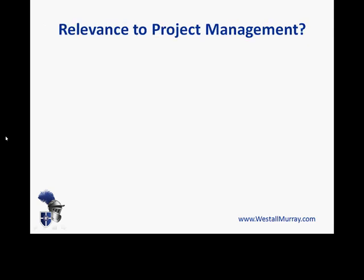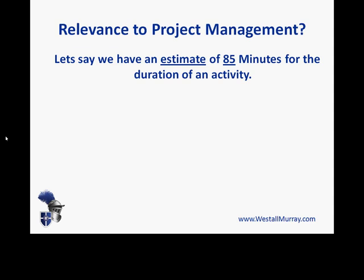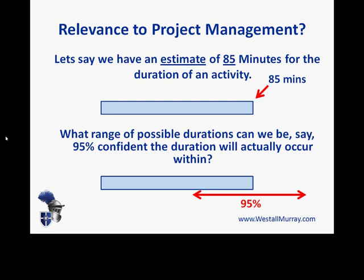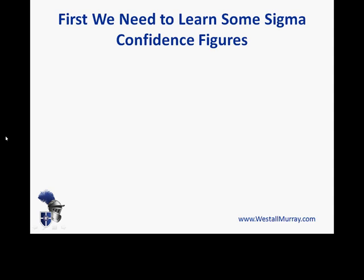Moving back to project management — we estimate a lot of things in project management. Consider an activity where we've estimated the duration to be 85 minutes. That's only an estimate. What we might want to know is: what is the range either side of that 85 minutes that we can be 95% confident we'll hit when this activity actually takes place? In other words, what is the earliest and latest likely duration specifying the range we can be 95% confident of landing within? To do that, we need to learn the following table of confidence levels that equate to different sigma values.